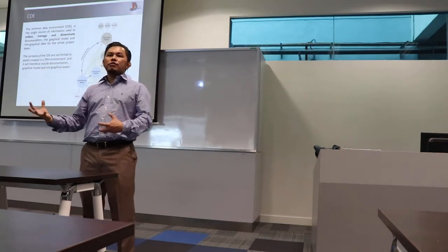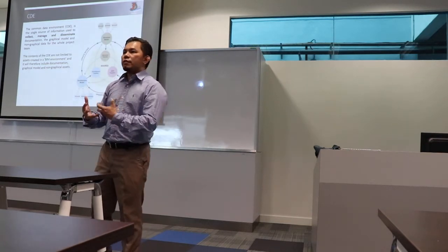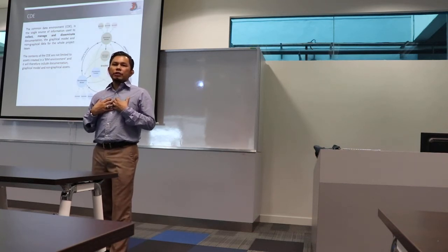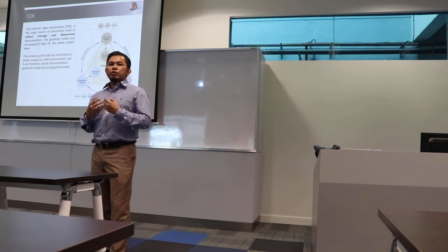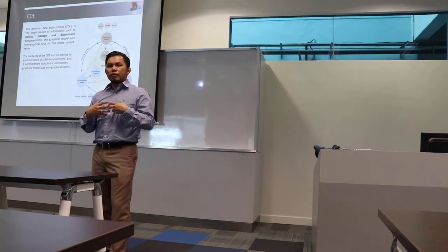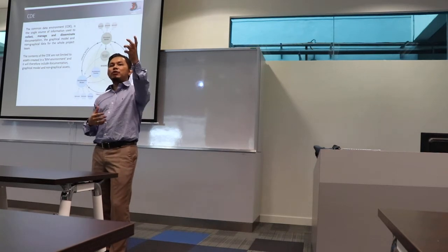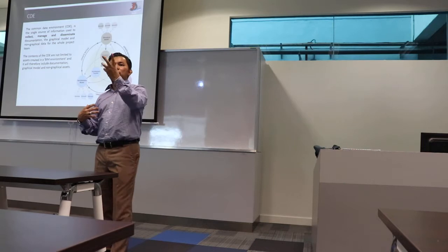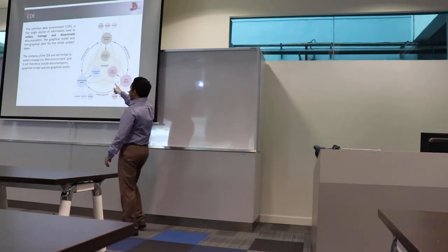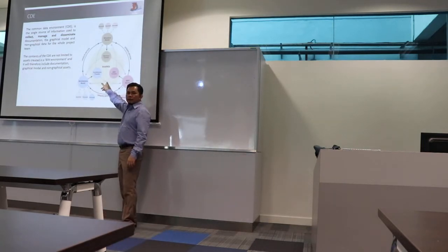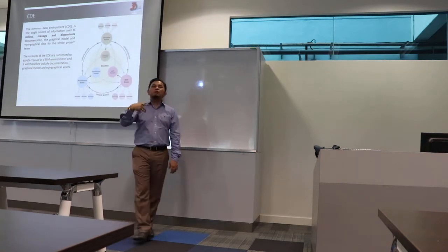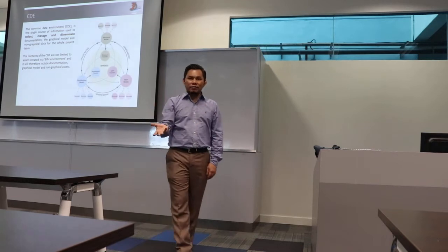So what is the use of the CDE? CDE is a platform whereby, let's say I'm the structural engineer and I want to update my model, I have two files. One is my working file, the other is the file I'm going to share. I can keep whatever I want in my office, and what I want to share, I put in here. Once I put it in, everybody knows there is a new, updated file.